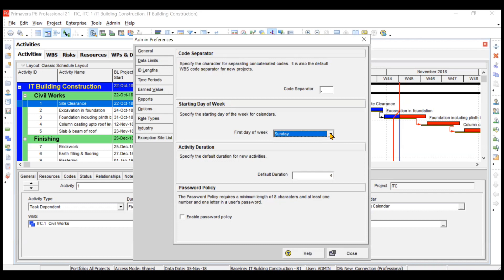By default, when you create a new activity it will take a duration of four days. But if most of your activities are 10 days, you can change the default duration to 10 days. If you want to enable the password, you can create a password also.